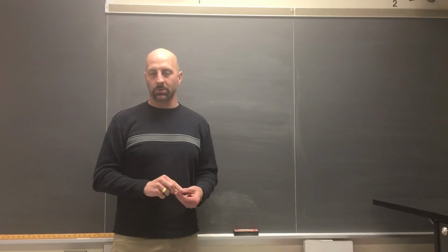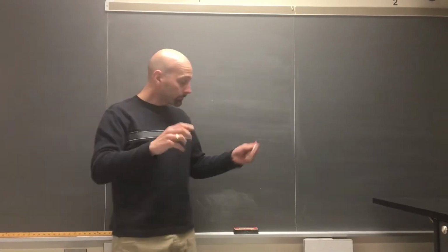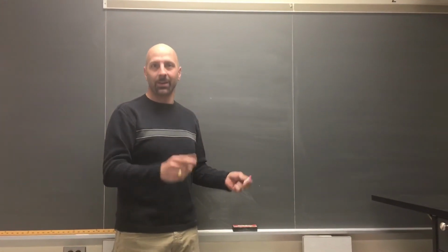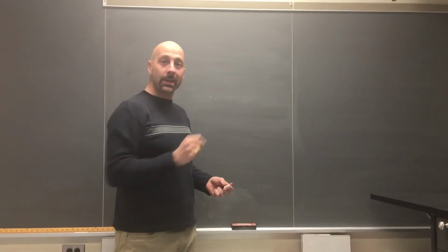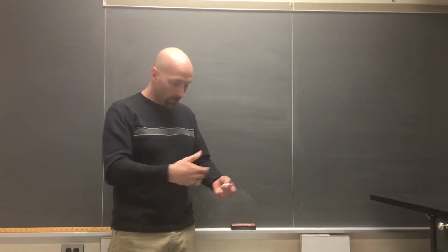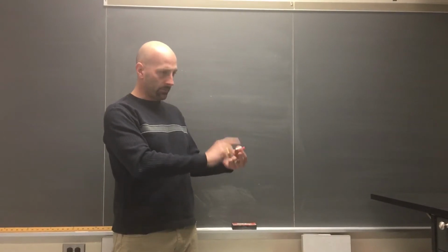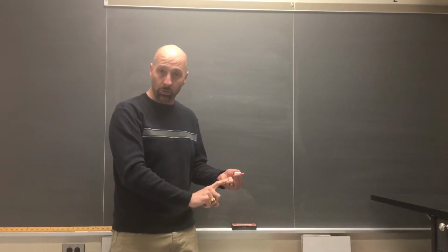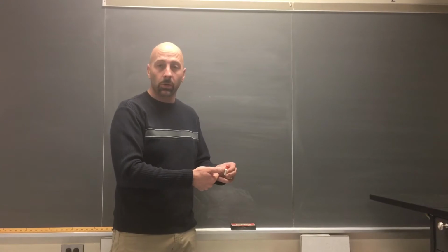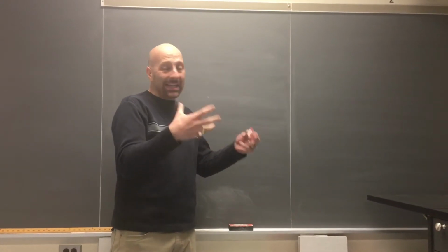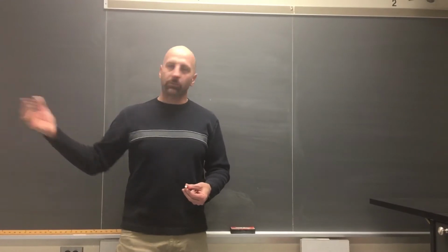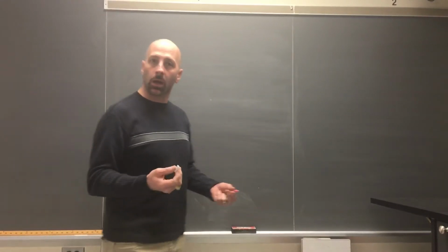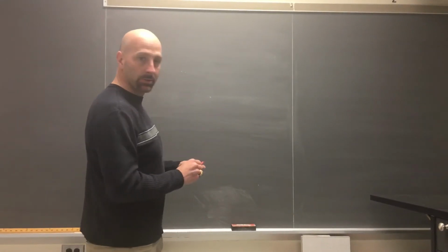Planned value is the opposite. I'm in a windowless office, and I have a calendar. So if I know that on my calendar it's day 25, well, I look at my plan and I say, well, I should have the foundation poured, I should have half of the walls up, and I should have the windows starting to go in. All right, so that's what I expect to see. That's what I plan to have done when I finally go look out a window somewhere. It looks like this if we bounce these two off of each other.